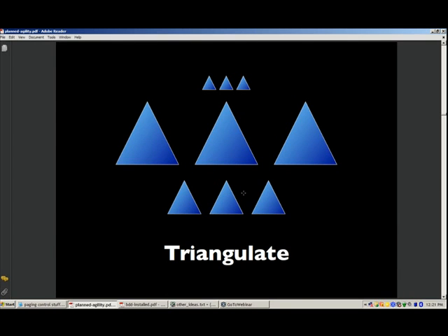All right. So triangulation, and the way I understand this is that sometimes we want to go back through our stories that we've completed and say, about how many hours did this take, or was this really a 1, things like that. At my previous job, we had this thing called the User Story Hall of Fame. It was just a little pegboard that we put up on the wall, and we would periodically, during retrospective, for example, go through our stories and say, this really was a 1. This really was a 2. This really was a 4, whatever numbers we're using.